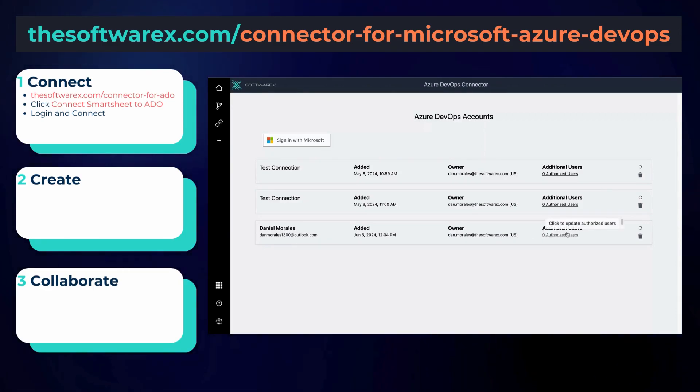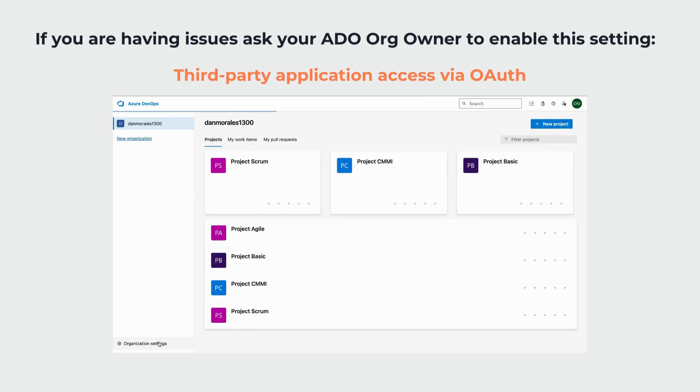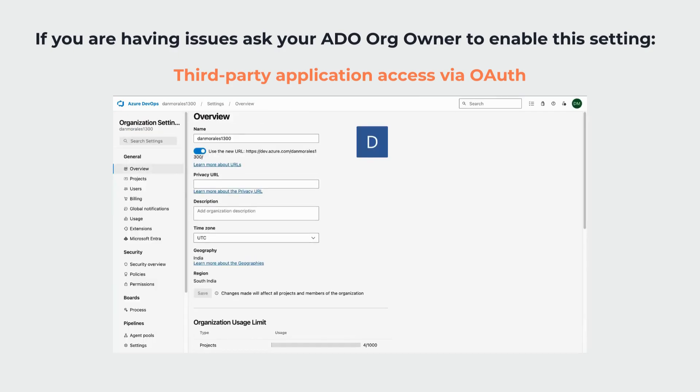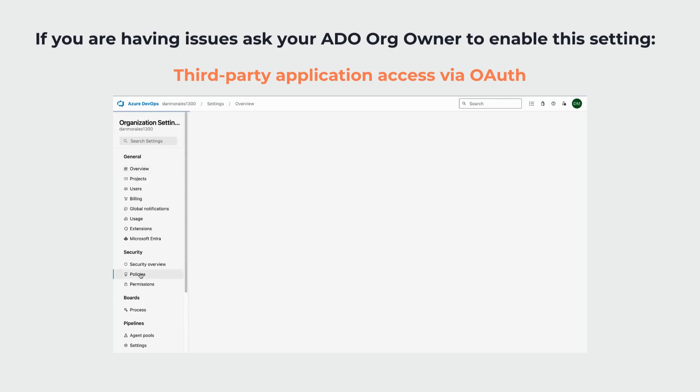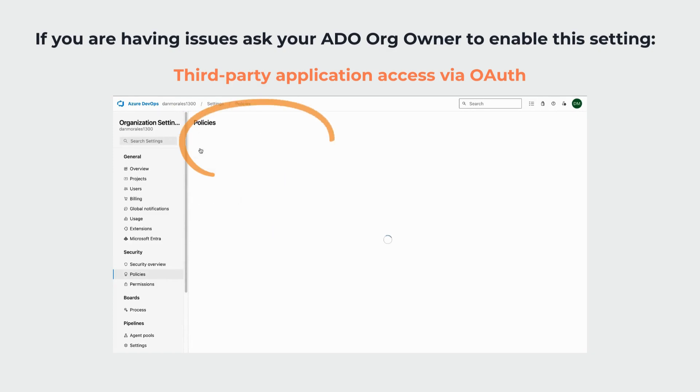If you encounter any issues logging into ADO, you should make sure that the third-party application access via OAuth policy is enabled by your ADO system admin in your organizational settings. Otherwise you will be restricted from connecting. Once that connection has been made, you're then ready to make your first workflow.